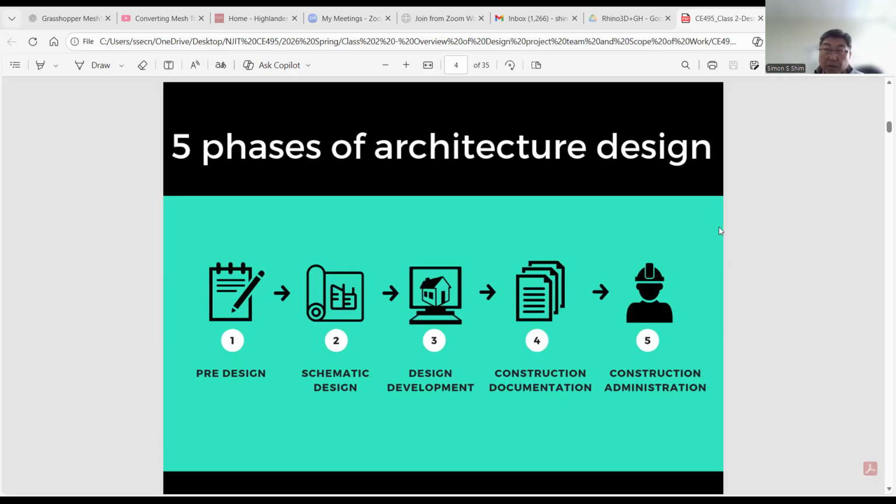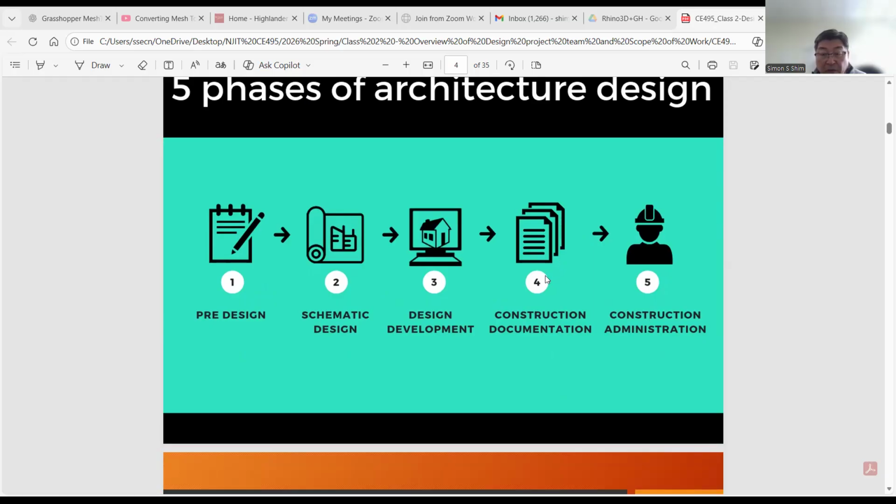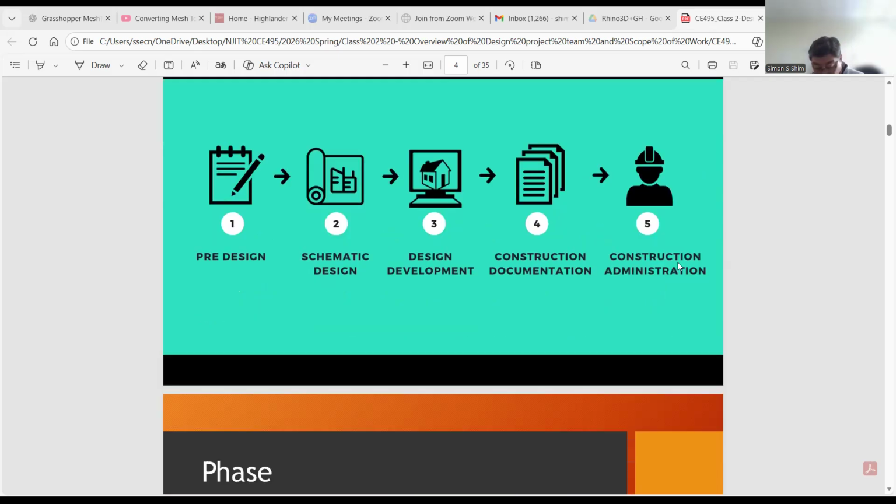Typically, as a structural engineer, we develop structural drawings and sometimes specifications and some other design narrative, but structural drawings are the primary deliverable, and we usually deliver the specification to the client. After all construction documentation is complete, the client puts together a bidding package and invites the bidders for their bidding procedures.